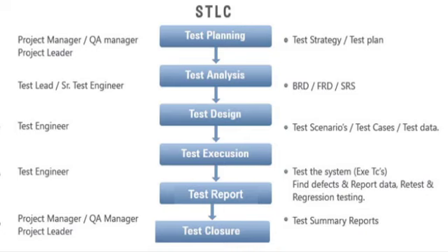Okay, test initiation. In this phase, project manager will develop a strategy to test by considering overall project. Here, test strategy is a document which specifies which role is going to be played by whom and who are responsible for what, and what kind of tests to conduct, and what are the risk factors, etc. After preparing a strategy, project manager will select the suitable team leads for the current project.